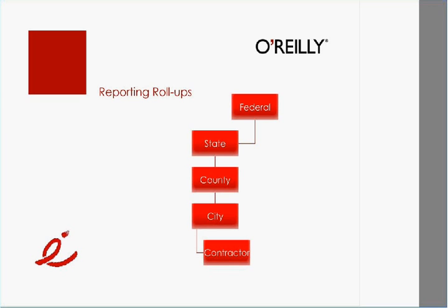So it's very critical. Now if you're wondering, okay, so how often should these roll-ups happen? How frequent will this information be passed on from one to the other? From what I've seen and what I've read, it looks like once all this is in place, the reporting should happen weekly, which is on a regular basis.